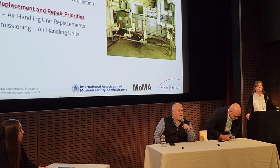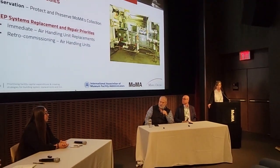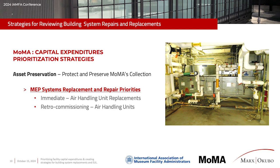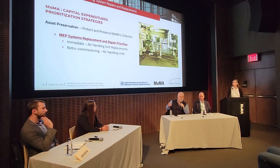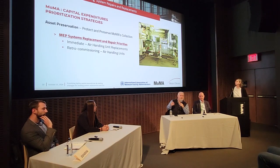So hello, I'm Joe Milam. I was fortunate enough to lead the team that evaluated the mechanical, electrical, and plumbing systems for the survey here. One of the things that we identified during our FCA were three much older, large main air handling units that we identified as priorities to replace. And those were replaced just recently. Then there are 75 or 80 other air handling units in the facility. We recommended that they retro-commission those and refurbish them as needed. They were younger units, so we were able to extend their life through the refurbishment and retro-commissioning. And that gave MoMA the opportunity to schedule some phased replacements in the future.